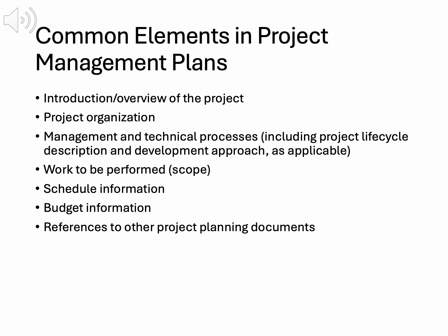The work to be performed, or scope, defines the project's deliverables. This draws from the scope statement, detailing what's included and excluded. For instance, the training project includes supplier management courses but excludes Six Sigma training, preventing scope creep. Schedule information provides timelines for key milestones and deliverables. A Gantt chart or milestone list might be referenced, ensuring the project stays on track.